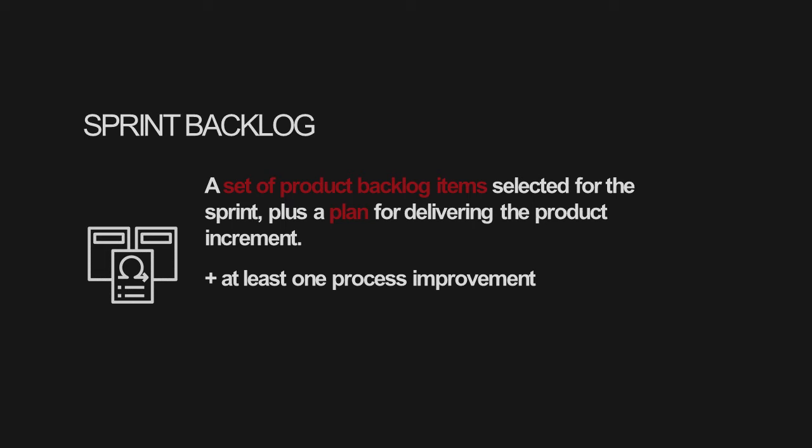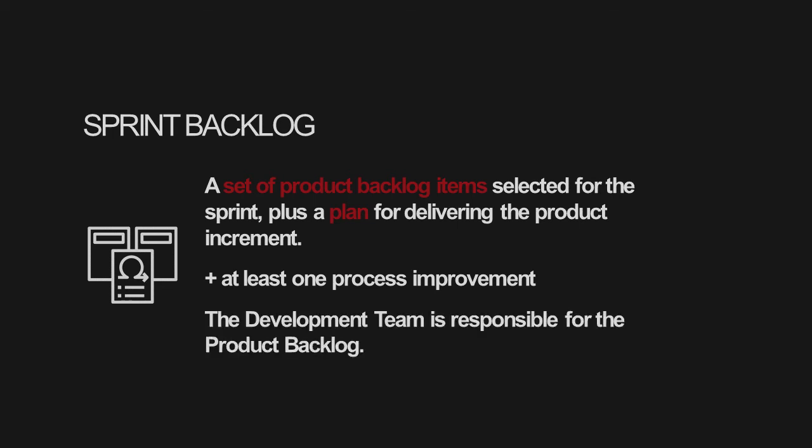If new work is required, the development team adds it to the sprint backlog. When something is unnecessary to create the product increment, it is removed. This artifact also helps to ensure the transparency in the Scrum process. So who is responsible for the sprint backlog? While product backlog is the responsibility of the product owner, the development team bears the responsibility for the sprint backlog.